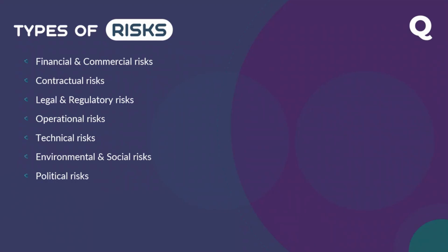One more thing, when you are assessing, you have to look into risk. Whatever has been explained will be taken care of by you as well as legal. But in the legal part, you have to think about one thing: if the contractor or an employer has a history of arbitration and claims, that is a risk. If you look from a legal perspective, if a contractor always has a history of court issues, litigation, arbitration, that's a risk for you.